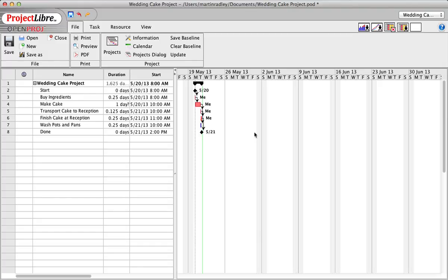So obviously, if you have resources in a schedule that are assigned 10,000 hours of work in a year, the 6-month duration is not viable for that schedule. So this is the kind of thing that I'm talking about, where what you want to do is have your Project Libre schedule model a realistic, viable schedule.